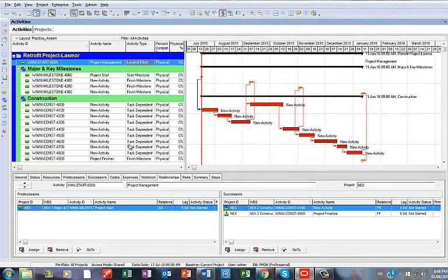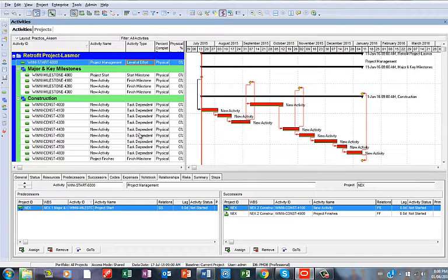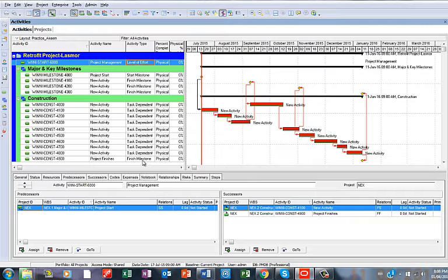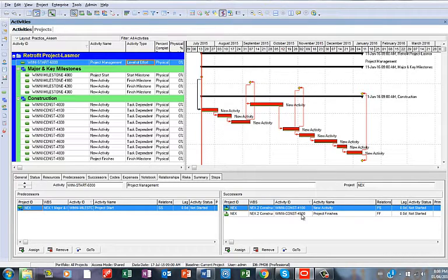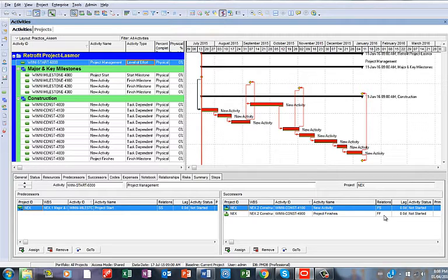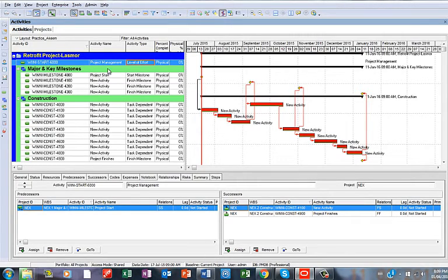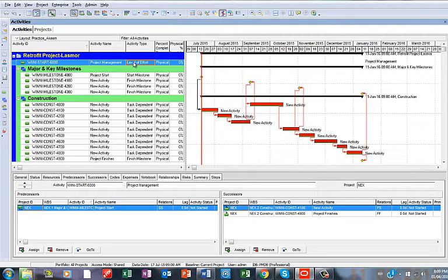You want to roll up to wherever you want, but here in this video tutorial it's been rolled up to the finish milestone. That's why it's being assigned as Finish to Finish. So after applying that, you will come across the fact that the Level of Effort bar didn't show up.